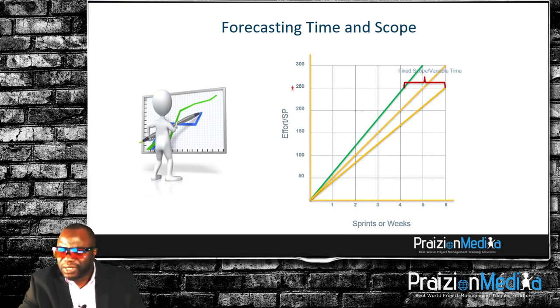So a stakeholder asking for 250 story points worth of work, from this velocity chart, you've got an idea of how to bargain with that stakeholder, right? Over a period of 4 to 6 weeks, you could tell them, we can't give it to you in 4, but definitely somewhere between 4 and 6, that kind of thing. And then if a stakeholder asks you for, let's say, 150 story points, you've got an idea of the span of time that would take.